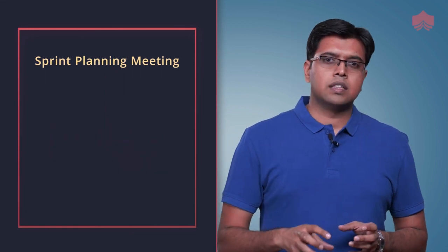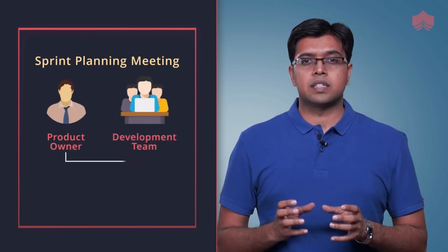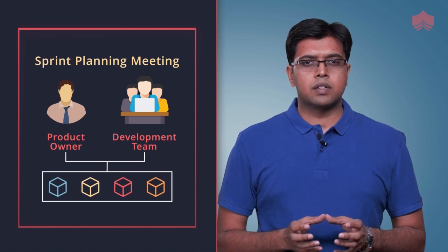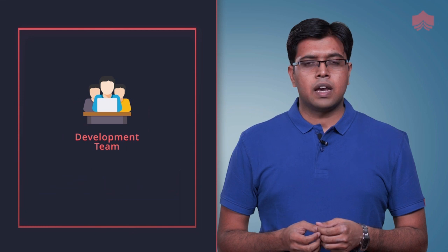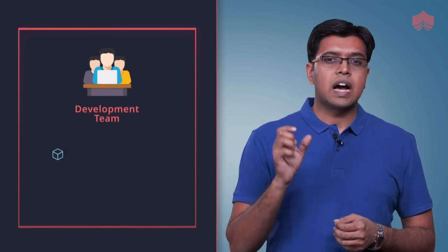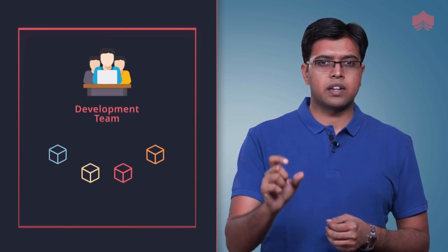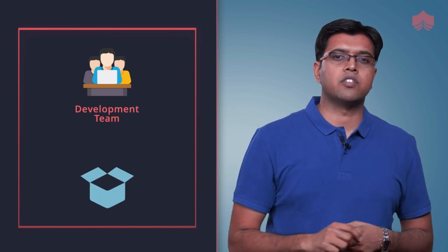And over here, the product owner and the development team decide what ready items can be built. And this is based on the capacity and the past performance of the team. And at the same time, the development team decides how these selected items will be converted into a done increment.